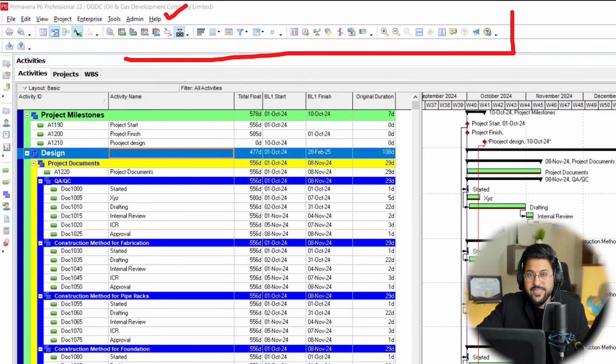Then within the contract, one thing is mentioned: our contract type, like EPC, DBO, BOT, that is how we are going to deliver this project to the client, what the major milestones are, our delivery method. Then contractual milestones: our design phase, when it is going to start, how much time it is going to take; procurement, what the long lead items are, what the critical impacts of procurement on the construction are. So these are the things you need to understand, because if you do not understand such data, it might be possible that knowing Primavera P6 is not going to benefit you that much.